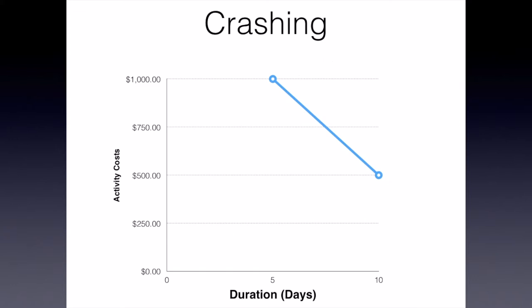Once we have that amount for our tasks, we keep doing that for all the tasks on our critical path and see which are crashable. We may have some that we simply cannot reduce in time no matter how much more money we pour into them, and each specific task will have some limit. In this case it's five days. We couldn't, for example, crash this to just three seconds if we put $12 million into it — it's just not reasonable to consider.